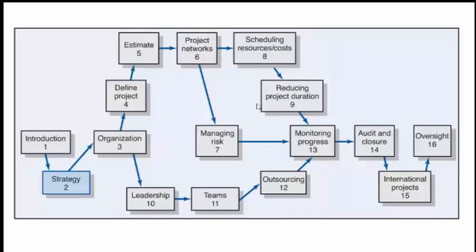Then you try to estimate the project. For example, normally you have 4 to 5 function points per week. One person, let's say, can do 1 function point per day. That is the industry norm. Then you have 5 function points per week. If you have 100 function points, so what we are saying is it will take about 20 weeks for one person to do. So you try to allocate to different resources and see how long it's going to take, and then you come up with the scheduling.